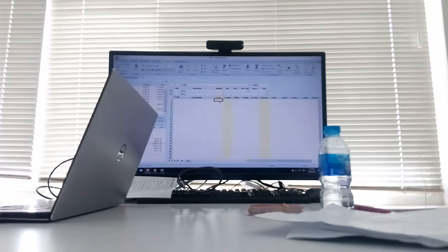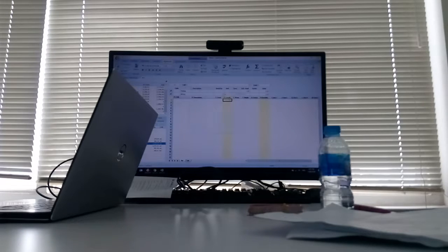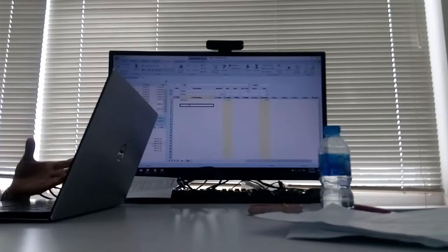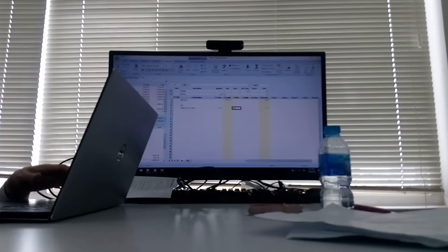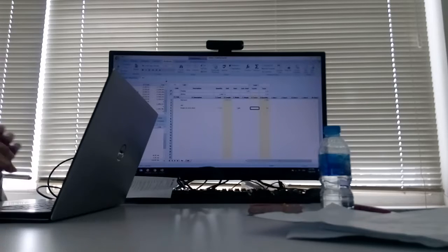And if I want to do the skirting, I select this bedroom. Okay, that's my length. There's some deduction because maybe when you do the measurement, you do not deduct the openings. Then you can deduct in the workbook itself. Just like in Excel, you do the deduction, select the doors, then put it inside, link with your door, each of them the width for example. This one is meant to be deducted, you put -1. So it's a very Excel type of breakdown.